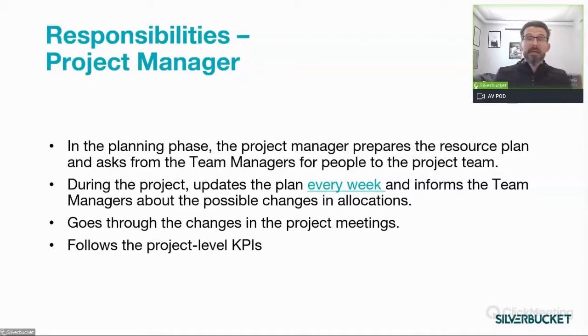When a project has been started, the project managers must constantly update the resourcing plan. It must be revised on a weekly basis at least, and well, it's a good practice to update the plan immediately when some new information is available. Well, of course, the team managers must also be included here each time that some allocations change.